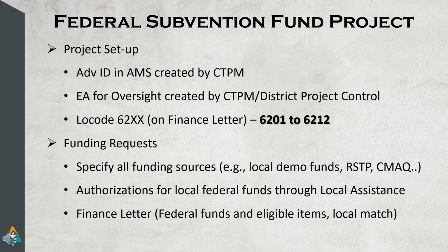Project setup on subvention projects is typically handled by the capital side of project management. Before we get into it, why do we need to subvent funds? Why does an agency subvent funds to us when we work on local projects? When Caltrans works on a local agency project, we need to get paid for it when it's anything more than an IQA. Typically, the co-op helps identify what those funds are, and Caltrans will invoice the local agency when the local agency is using federal funds. The local agency will then turn around and invoice Caltrans so we can pay them with the federal funds.